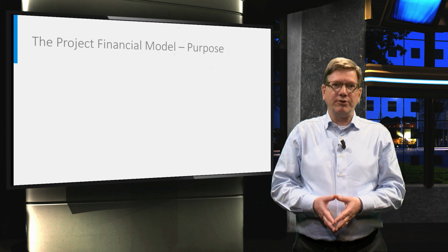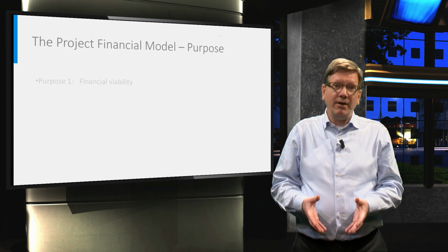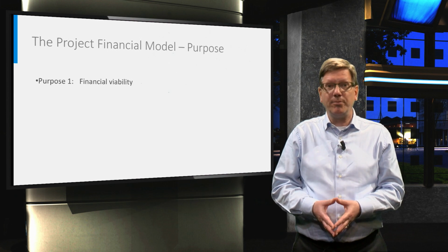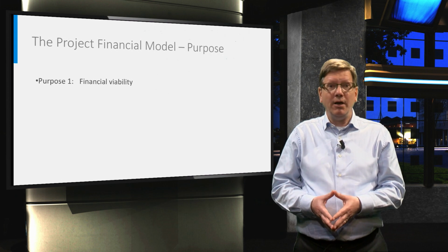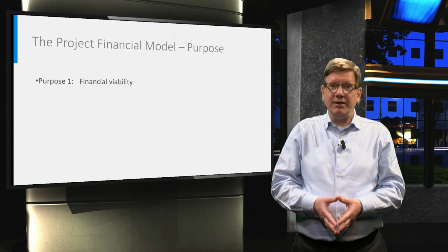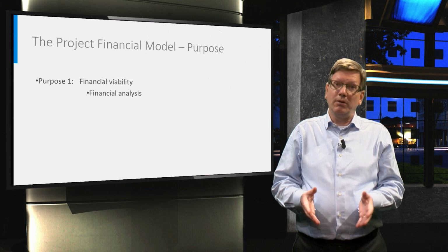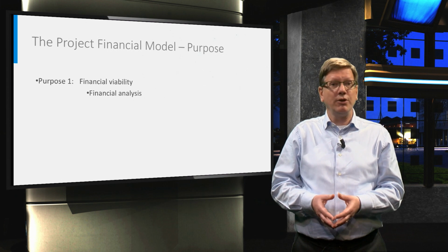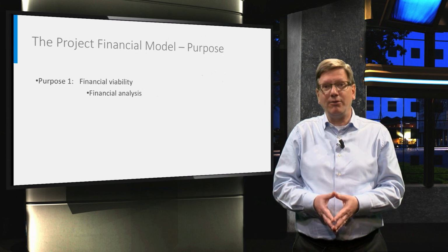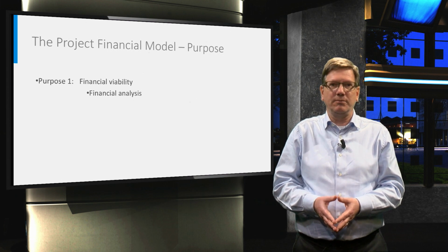The primary purpose of the model, of course, is to confirm the financial viability of the project for the investors and the lenders. In week 1, we saw that the financial viability is driven by financial analysis of the expected project cash flows using the NPV, IRR and DSCR calculations.